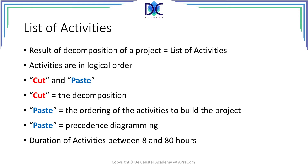As a rule, decomposition ends when the activities that we obtain at the bottom of the WBS are between 8 to 80 hours — meaning between 1 to 10 days, or 1 day and 2 work weeks.